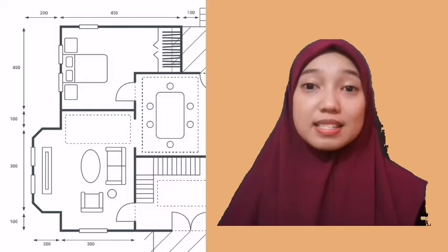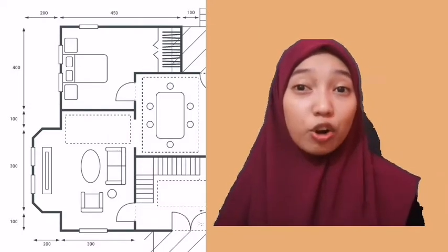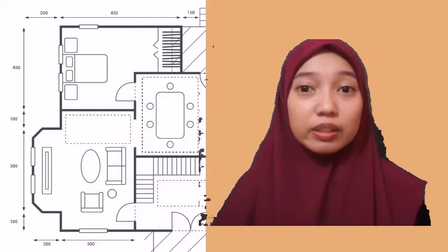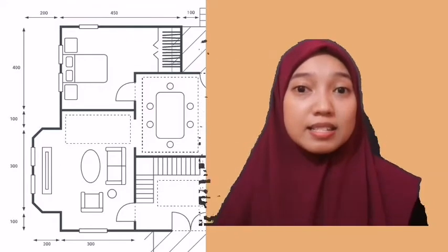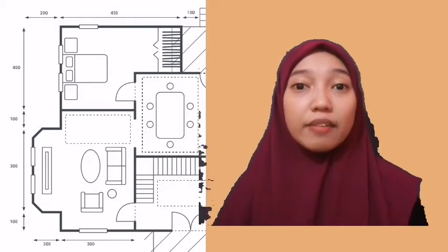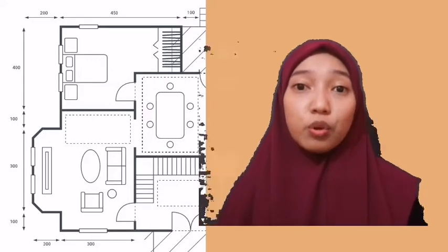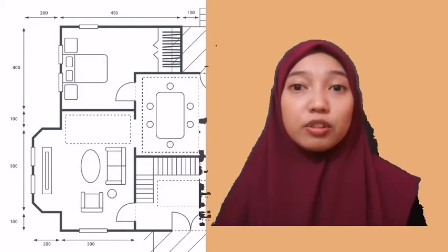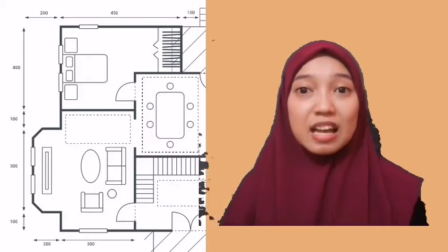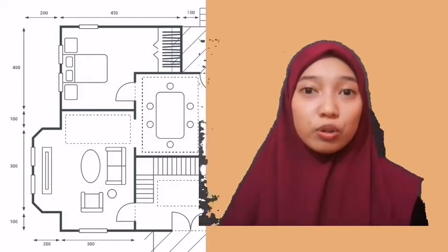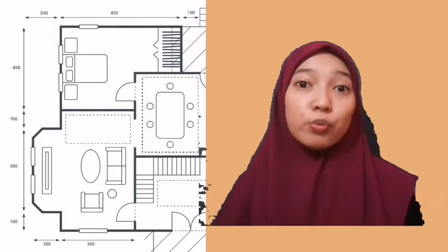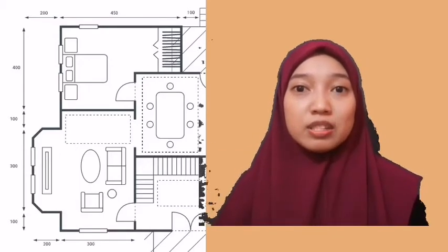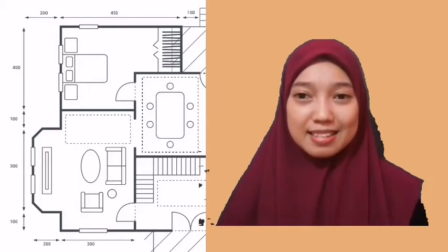So for the conclusion, once the tender evaluation process is completed, the evaluation will be summarized into a report based on the evaluation process. The evaluator will make a suggestion to the client for the best tenderer to be nominated for the tender. It is then up to the client to decide whether they want to nominate the suggested tenderer, which concludes the whole tender evaluation process.